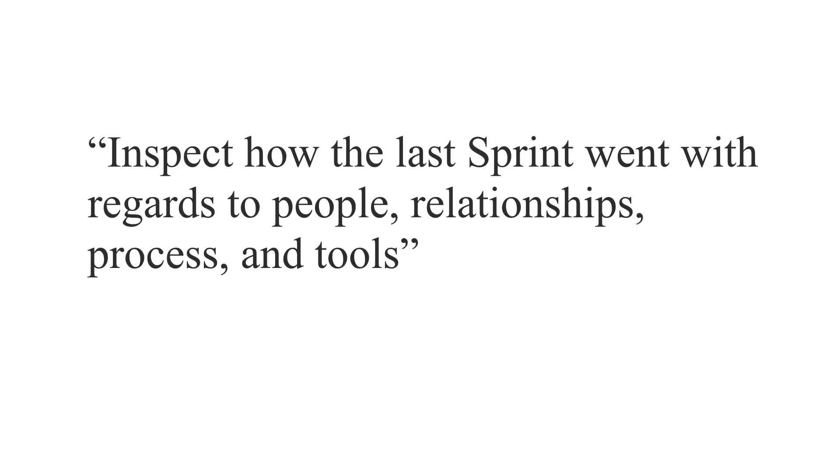The Scrum Guide is very specific about the purpose of the Retrospective. It lists these three points. First: inspect how the last Sprint went with regards to people, relationships, process, and tools — everything but the product.